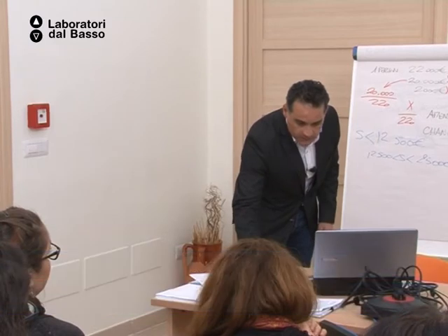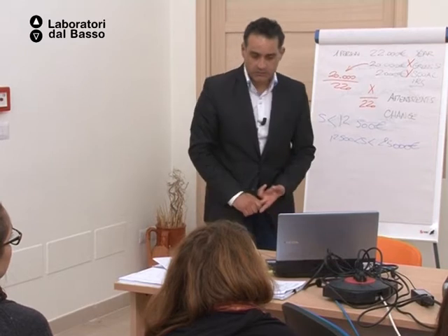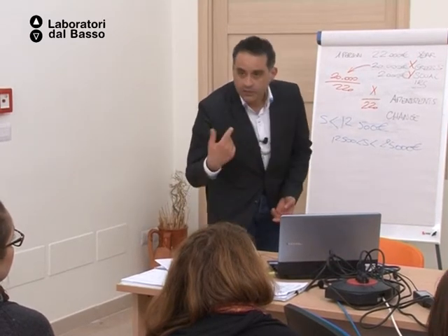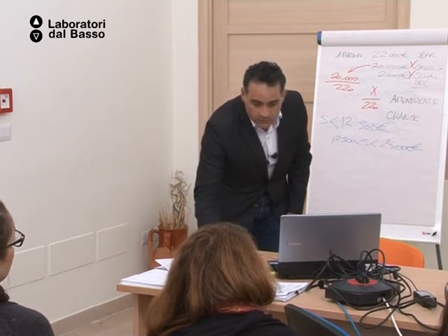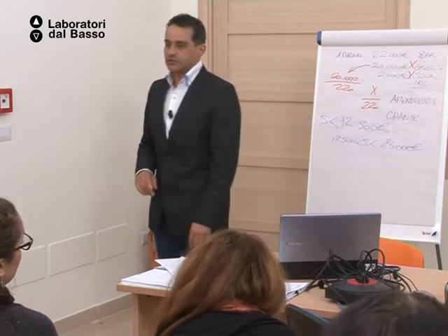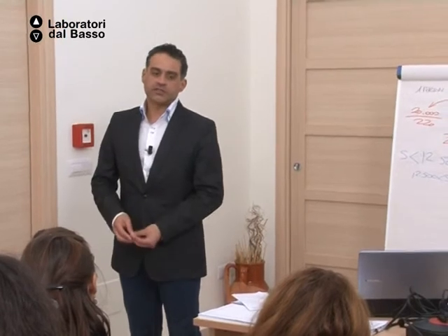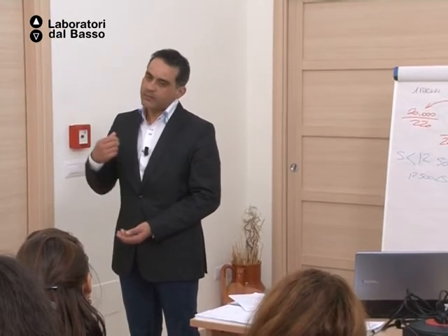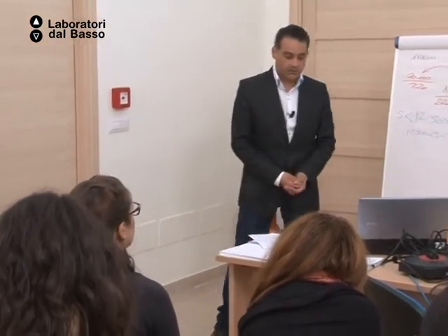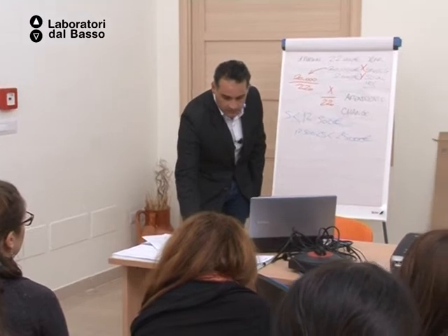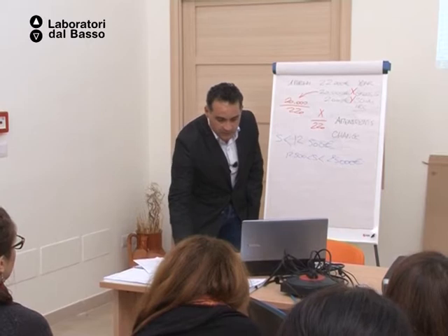So, see the logic here. According to the task description, you will have the partner identification, which are options that you can choose, again, according to the table. And you will also have the work package to link. At all times, you have the cost, partner, work package link. And be sure that at all times you don't copy-paste manually. Believe me, it's a lot of work, but it avoids surprises. And at the end, you have the total cost calculated for you.